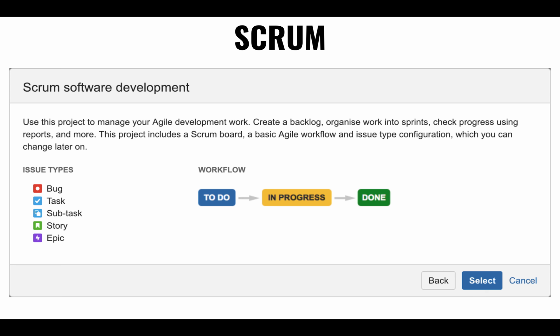Some other folks might like to put some workflow in here where you have the in progress. You might have an additional column here, QA, right? Meaning I've pushed it, it's going to build, and it's going to be available in the QA environment shortly. And you move your tickets from in progress into QA. And there, the QA engineers, the product owners, and the business analysts can bang on it and try to break it there, but it's no longer in my environment.